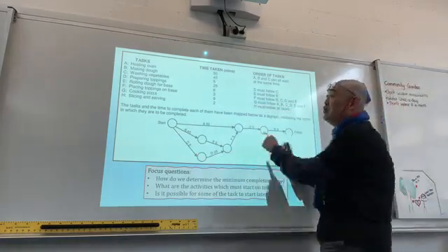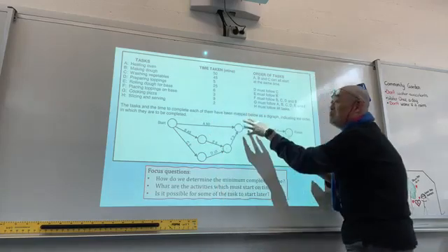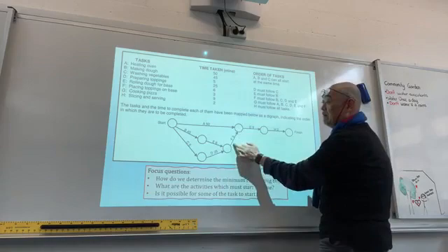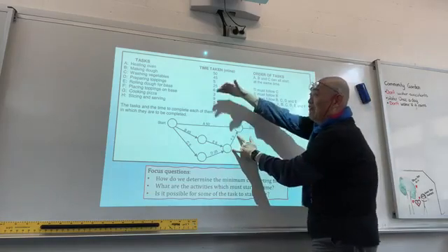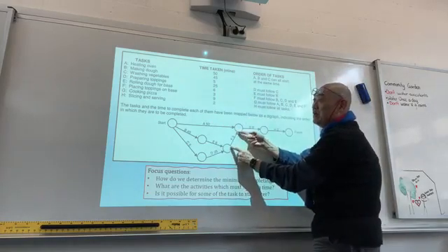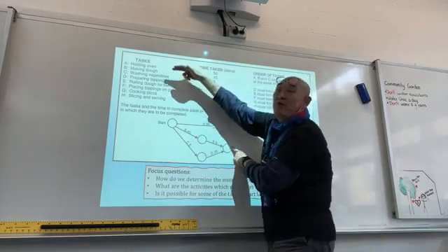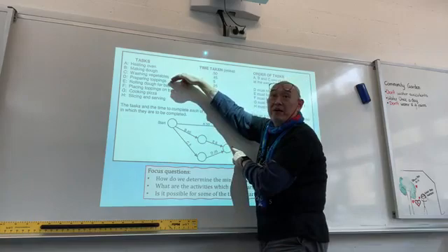However, F, placing the topping on the base. You cannot place any topping on the base until you have done rolling the dough and preparing the topping, right?